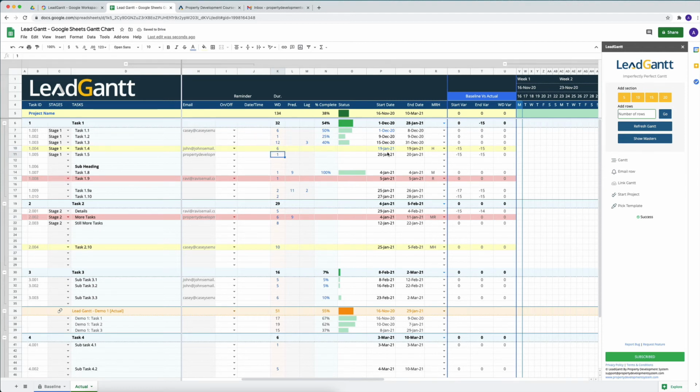and 6 work days, it is then going to start making these calculations and give us the number of days that it took more than what we had before. So because we had 1 day already accounted for and now the total is 6, that means there were 5 more days, and we've got a variance of 5 work days. And negative basically means a late start, and a positive number would actually mean that it's an early start.